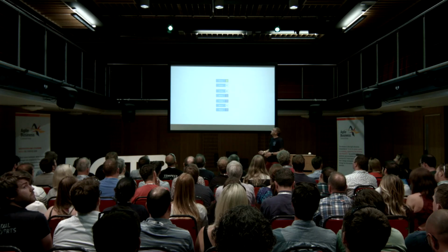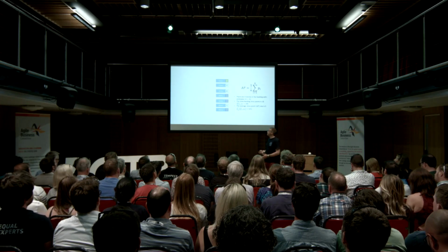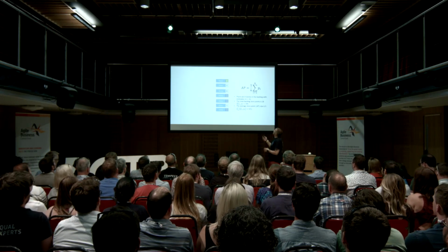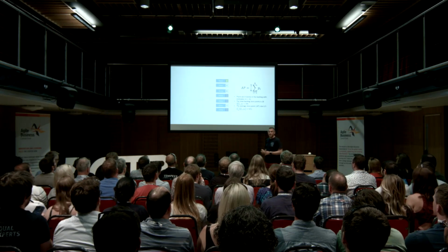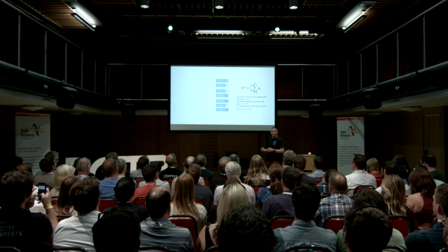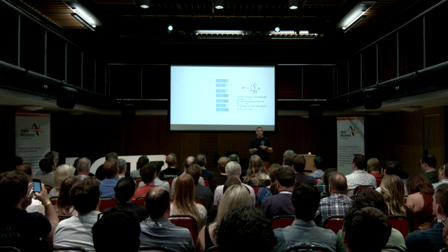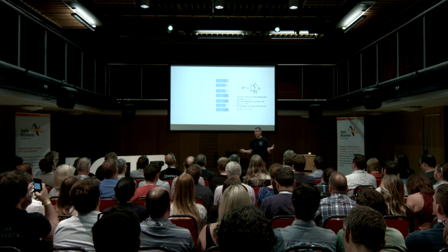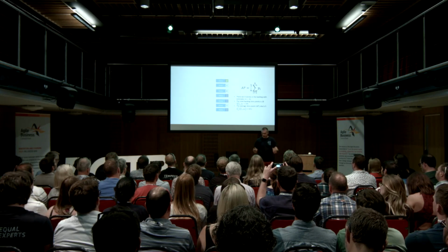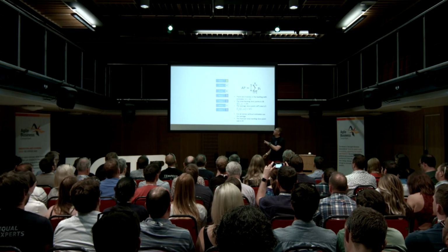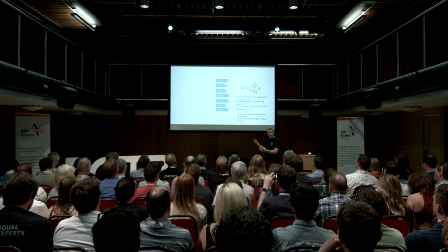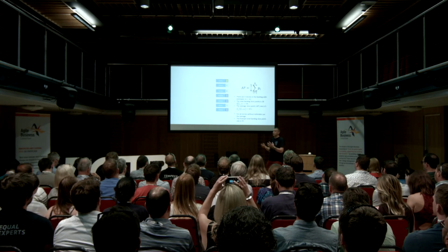To do that, we just use average story size. I hope there are no mathematicians in the audience. I thought that might look a bit fancier, but hopefully I've got it right. So we look at our backlog. We've got 4 stories with estimates. The total number of points that the team has estimated is 18, so our average is 4.5. Round it up and make it 5. Then, without looking at anything else, those stories that we haven't got any estimates for are probably going to be about 5.